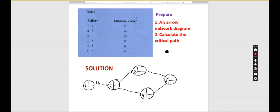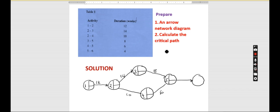Activity 2 to 3 is 14 weeks, 2 to 4 is 10 weeks, 3 to 5 is 8 weeks, 4 to 5 is 6 weeks, and 5 to 6 is 4 weeks. That is how the arrow network diagram looks. Now let's find the critical path.